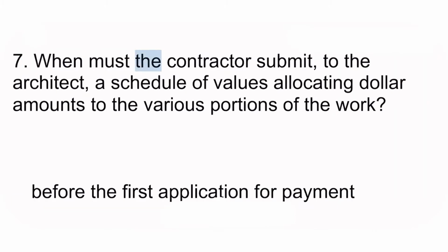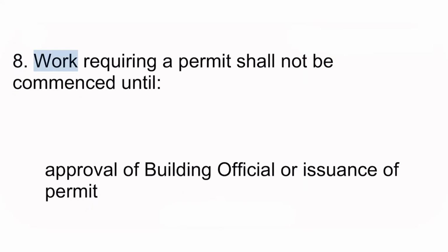7. When must the contractor submit to the architect a schedule of values allocating dollar amounts to the various portions of the work? Before the first application for payment. 8. Work requiring a permit shall not be commenced until approval of the building official or issuance of the permit.